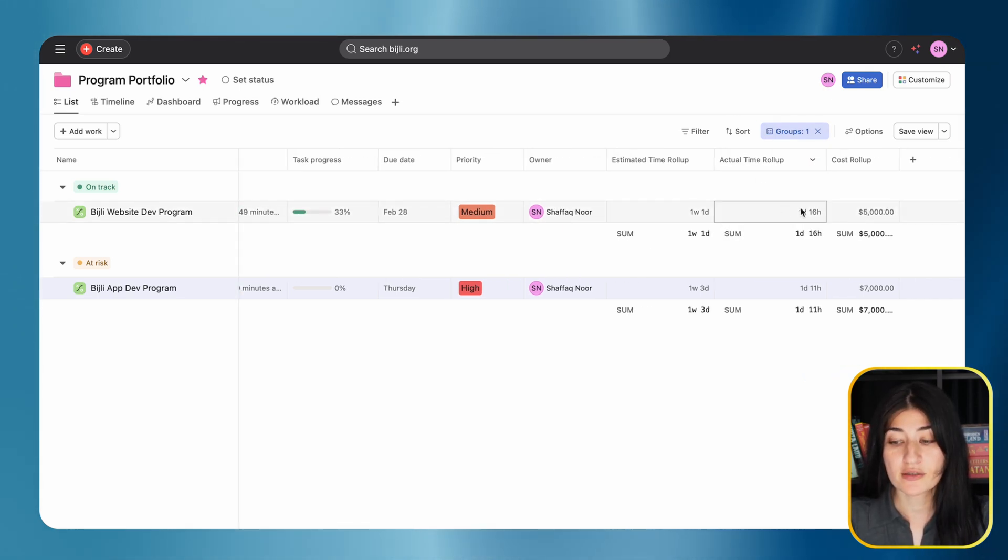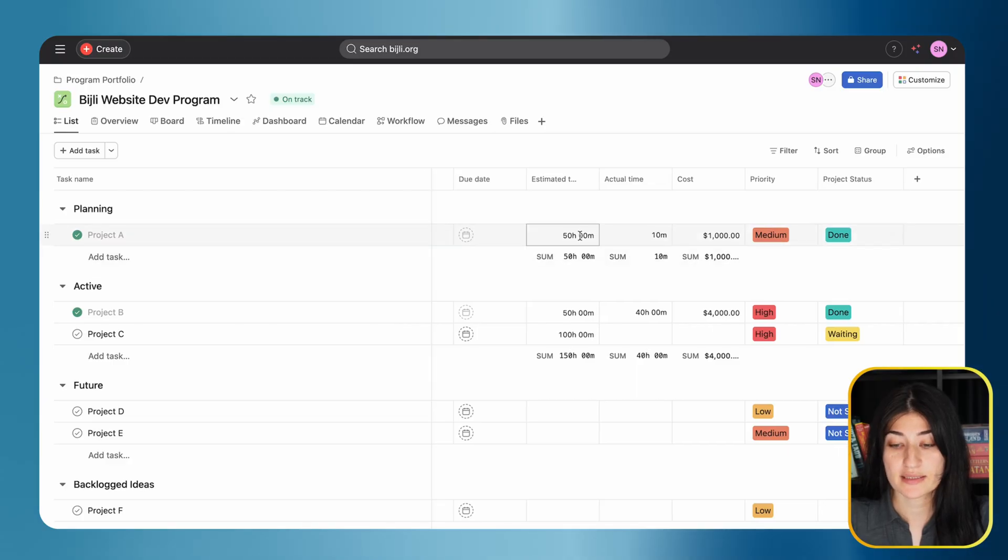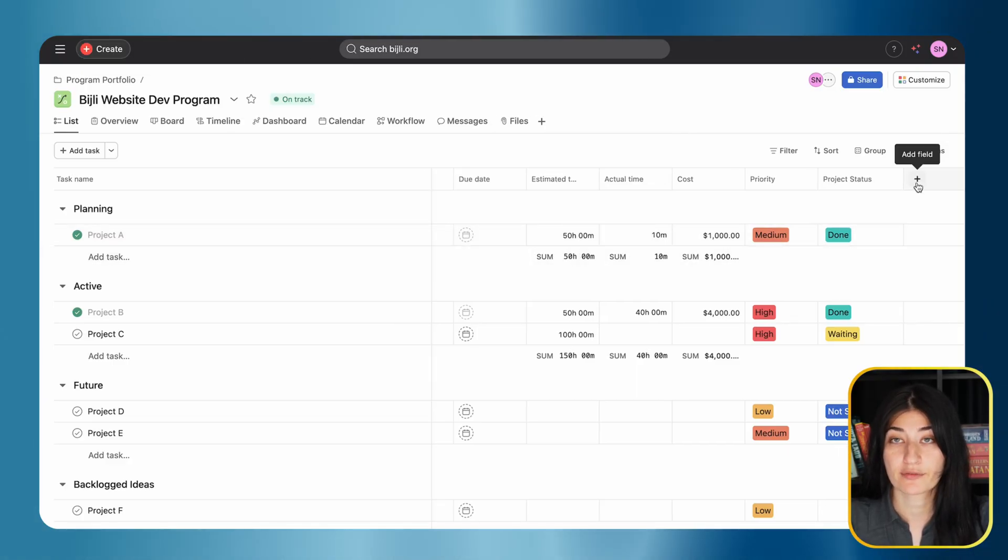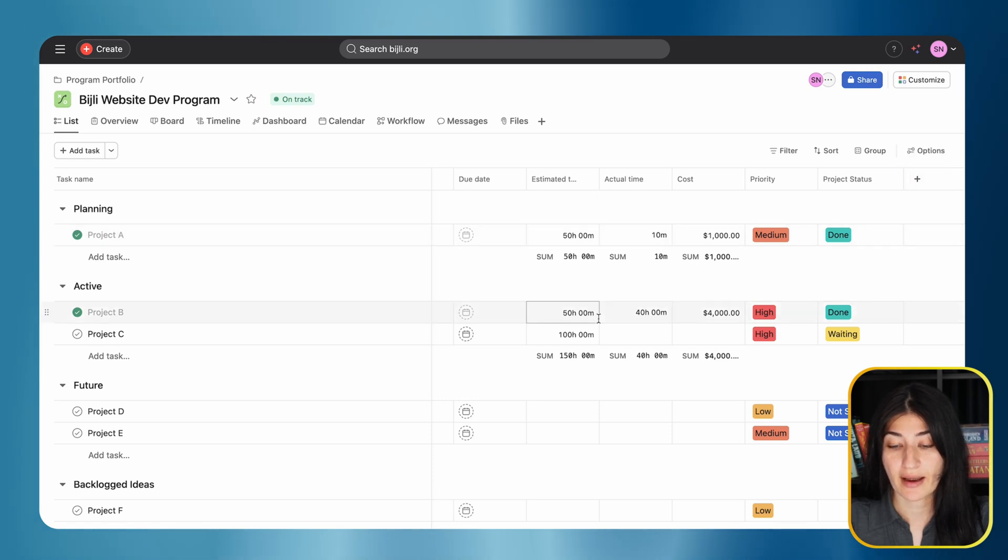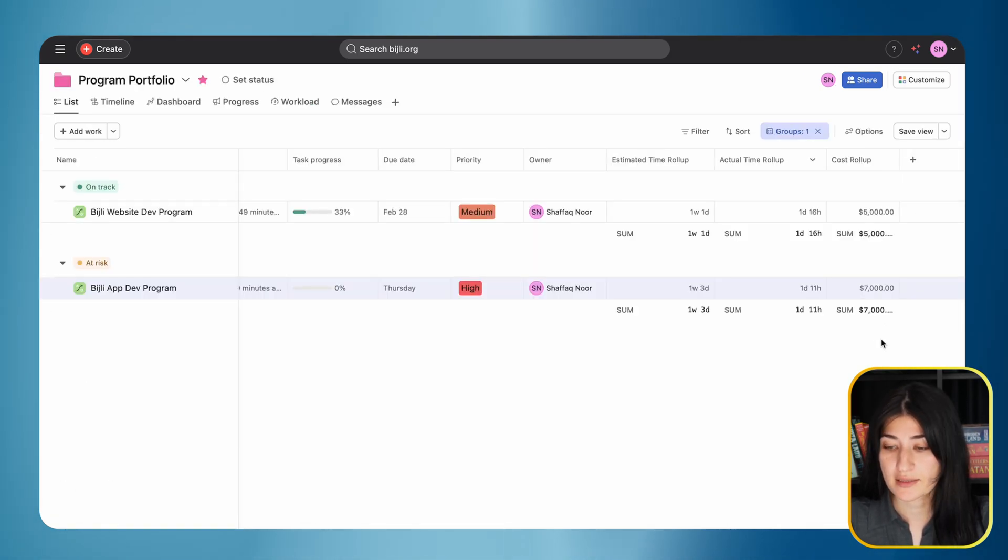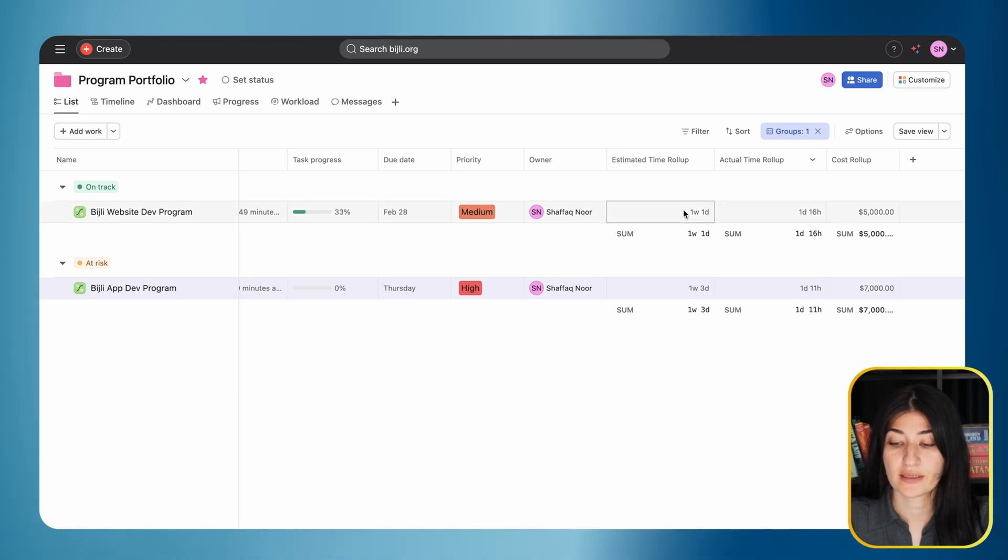If you want to see these in just hours, you'll want to create some custom fields for tracking within your actual boards. If I wanted to see just hours and not days, I would create a number field for tracking the estimated time with just hours, because by default Asana aggregates to days and weeks.